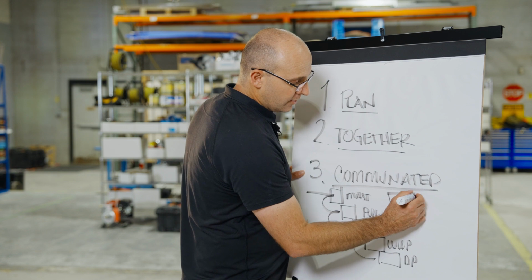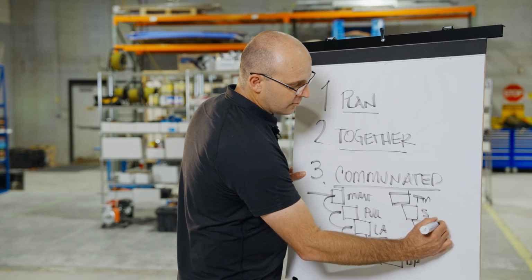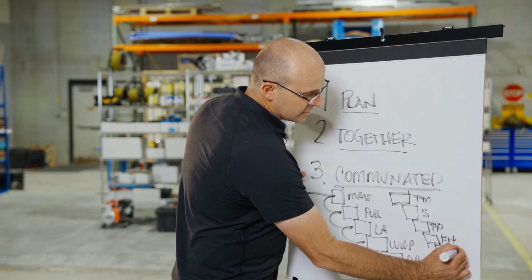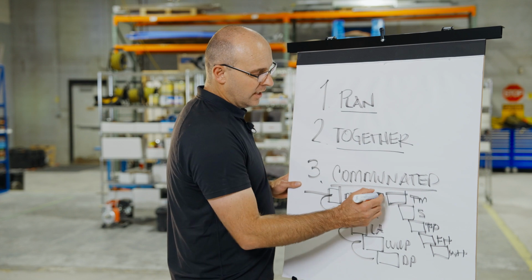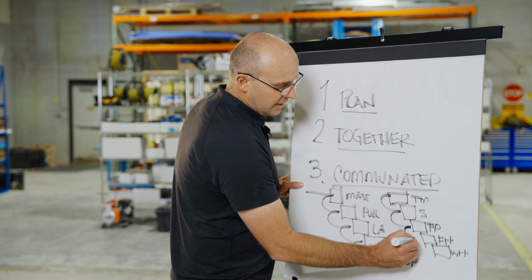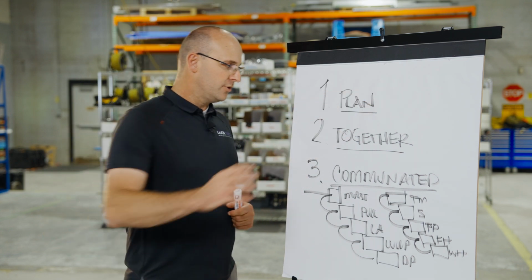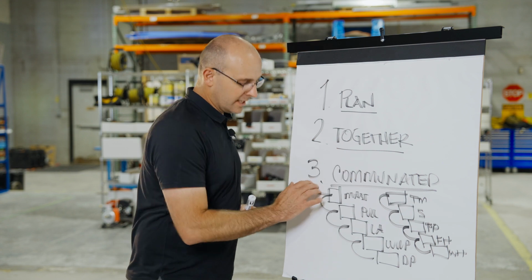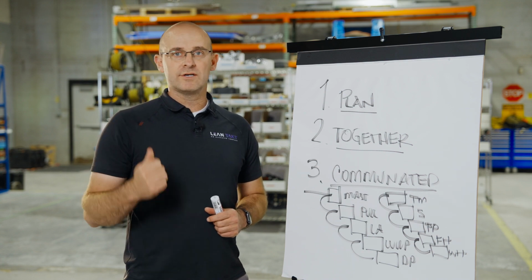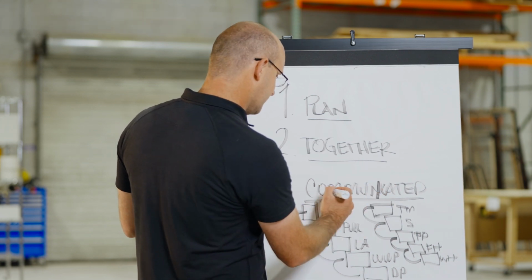But you should run your team meeting, your strategic planning and procurement meeting, your trade partner weekly tactical, your foreman huddle, and your worker huddle, so that the information for these scheduled deliverables goes from the team to the project to the trade partners for the next week, to the trade partners for the next day, and all the way to the workers. So not only do you have a plan, but you've planned together with your trade partners, and you've communicated through your schedule visuals and through your meeting system so that you can enable the work of the crew leaders and foremen.